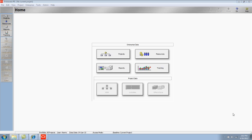Roles are assigned to resources to identify the resource's skills and core competency. Roles can act as placeholders until specific resources are assigned to activities. Roles can also help project managers and resource managers identify appropriate resources for specific activities.